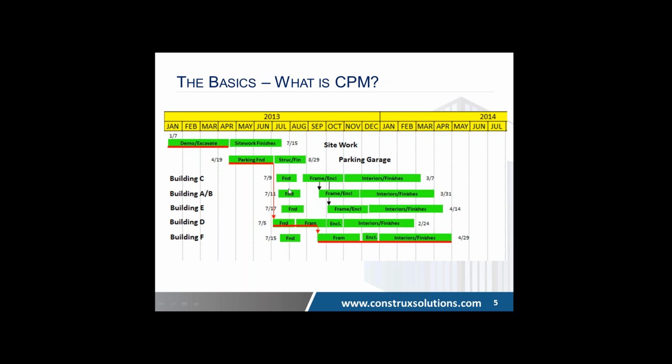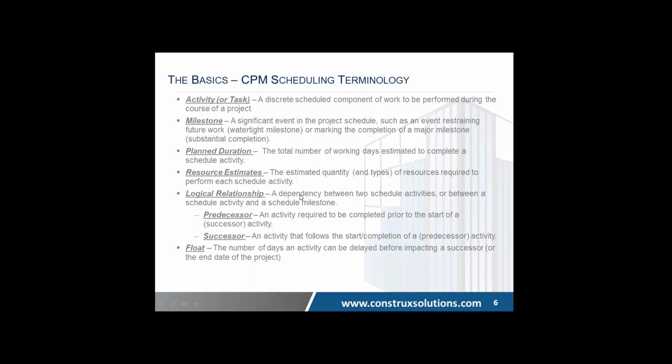If I just took this in Excel and I wanted to update that, it would be really hard on a regular basis to update all the activities to hold the relational constraints throughout the program and recalculate finish dates. I'd have to do that all by hand, and that's what the programs are best for, is actually automatically calculating that.